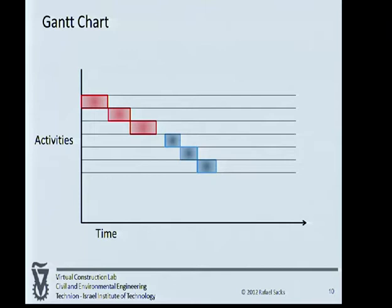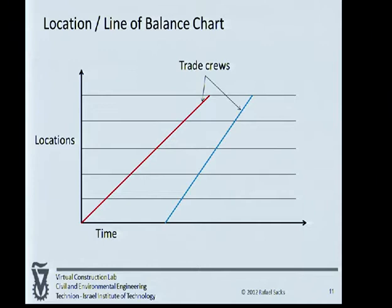Much of flow line and line-of-balance theory and practice was developed in Australia, so I'm not telling those familiar with it anything new. But I'll be using line-of-balance charts throughout the presentation. While your typical Gantt chart has activities and time across the bottom, the way I'll be presenting projects will have time across the bottom and locations up the side, so the work of teams is represented by lines that show the flow of teams through the project. I just wanted to put that as a frame of reference so some of the slides will be more understandable.